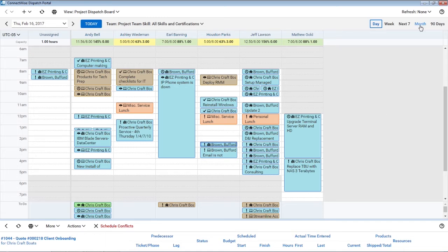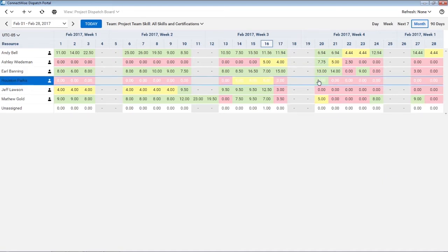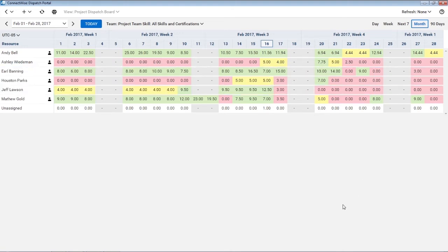So for us, if we look at that monthly view, which makes this a little bit nicer, we say that each one of our members can be booked 8 hours a day. So that's pretty typical for us. As they get above 80% scheduled, we turn their calendar green, which means they're already helping us generate a lot of money, so green for money. Let's not book them. Let's look for somebody who has red or yellow, because red for us means less than 50% booked. So I quickly know that I can allocate work there. Or maybe that means we have to get a subcontractor or something if everybody's green. Those are things that we can start to notice from this view.